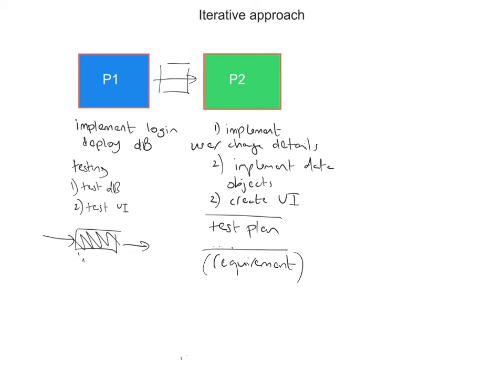Okay, well, it's not a problem. We have to ask ourselves a question: what sort of requirement is it? We have to classify it again. Is it a core requirement? Is it something so important that we must go back to our design and we must put this in?